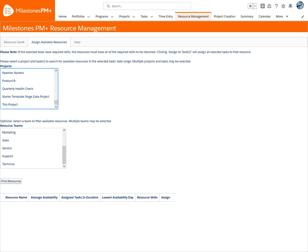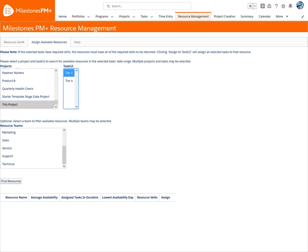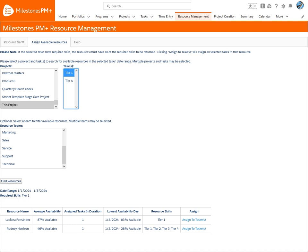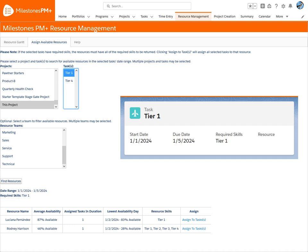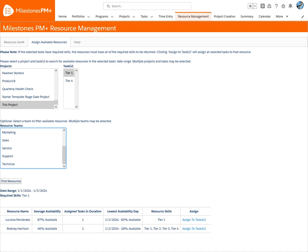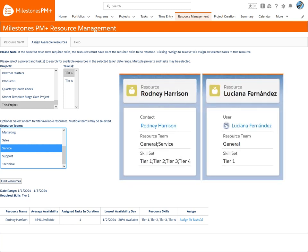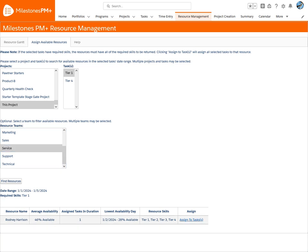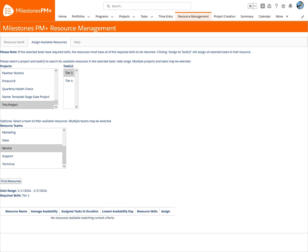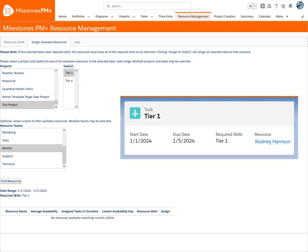Let's look for a resource to assign to the Tier 1 task. Two resources have the task's required skill of Tier 1 — all other resources aren't listed because they don't have the Tier 1 skill. But let's filter and search for only a Service Team resource. Rodney is the only resource with both the Service Team and Tier 1 skill, so we'll assign the task, which will show up on the Resource Gantt.